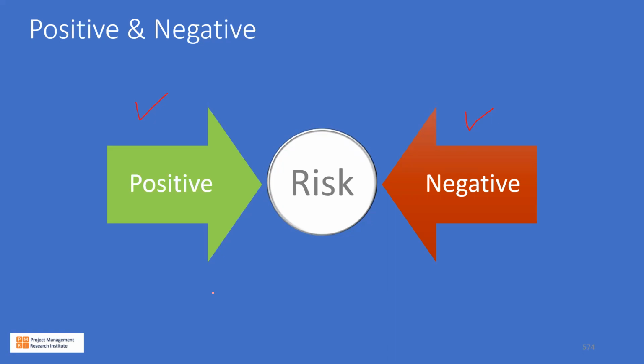So is the case when you're publishing a book and you are expecting 100,000 copies to be sold in the first 6 months, but then you realize that there is demand for 500,000 copies. So which is a very positive risk. But if you cannot leverage it, that opportunity is lost. So risk need not always be negative. There are positive risks as well.